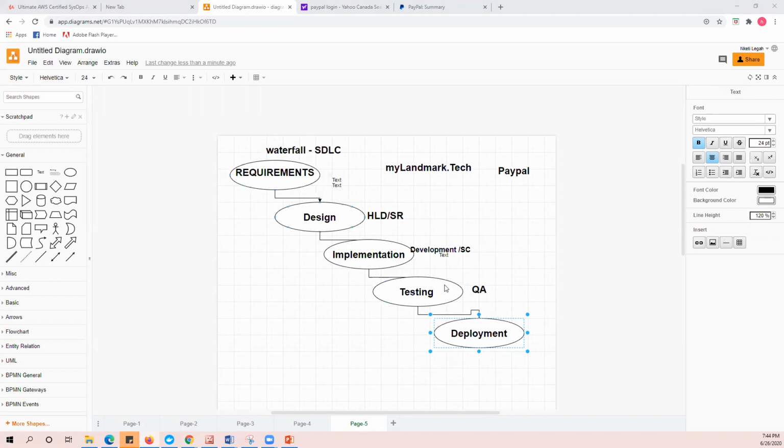When designers are doing their designs, for example, the people in charge of testing are idling, which implies that the slack time in the company is very high. Therefore, one of the major limitations here is low resource utilization.